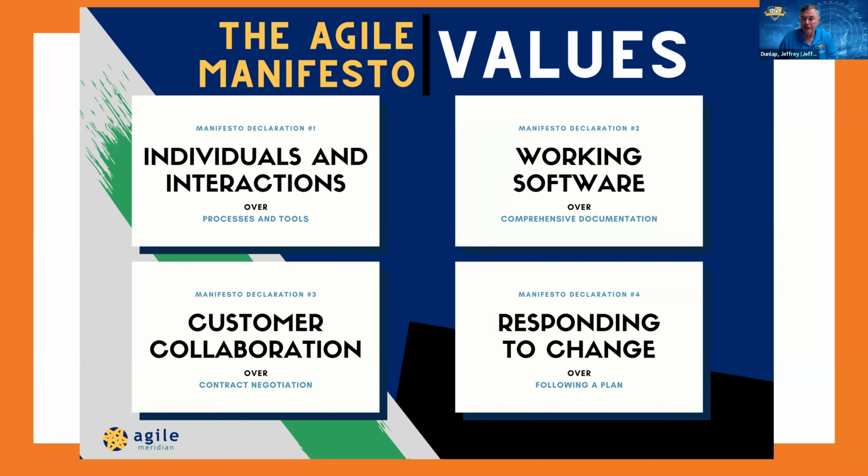And so we need to change our contracting strategy. Level of effort is one way to do it, a service type of contract. We're just going to get you on a service contract. We just want people to do work when we need you to do it. We'll talk about different contracting philosophies later in the course, but I can't be in negotiation with the contractor every time there needs to be a change.